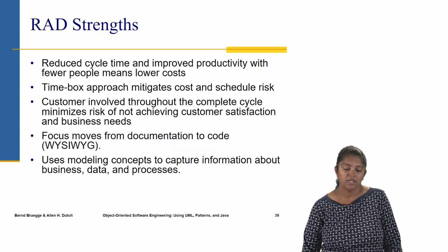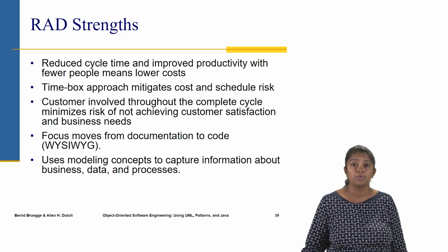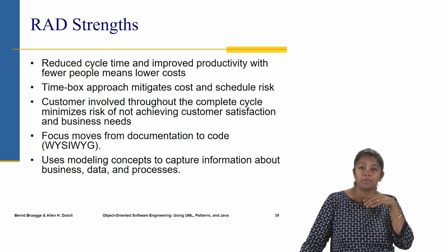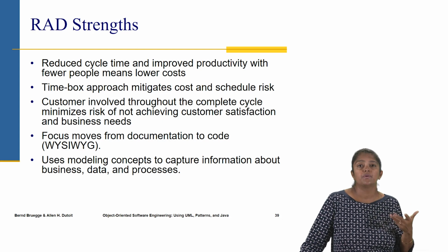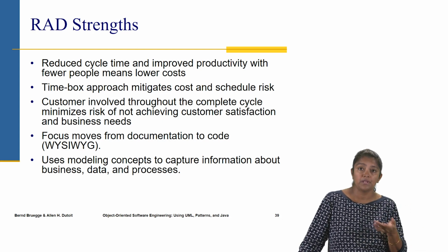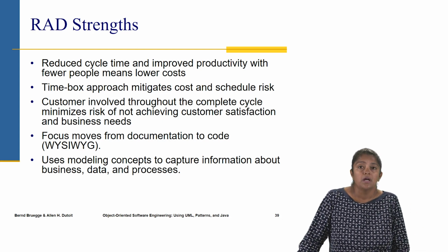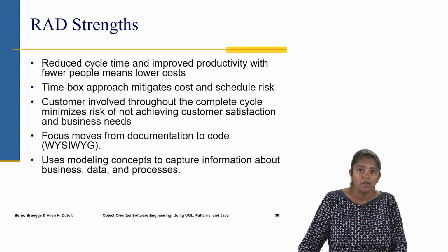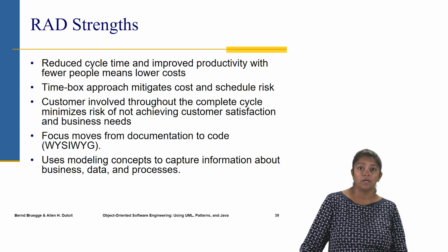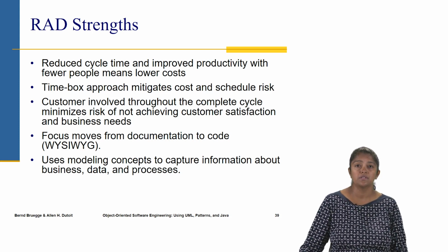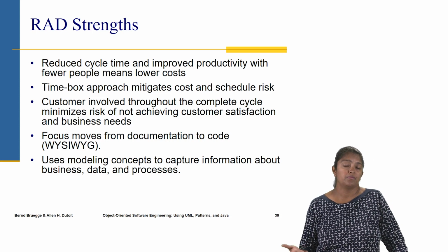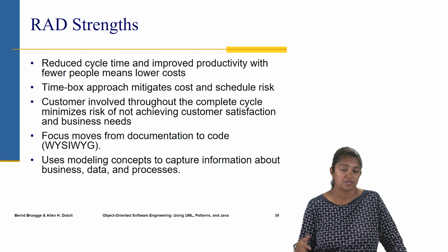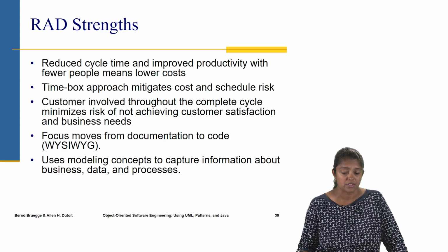So the strengths are that the cycle time is reduced, it improves productivity with fewer people, and a lot of tools are used. Because there are fewer people, it also means the costs are less. It's a time box approach, so it mitigates any risks related to cost and schedule. Now the customer is always involved in this model, so the possibility of having a higher customer satisfaction is much greater in this case.